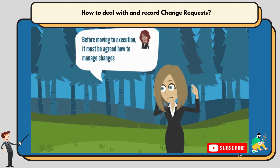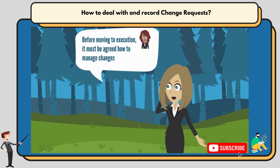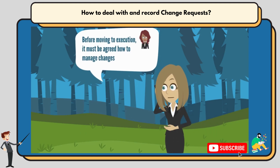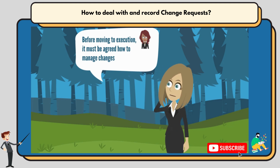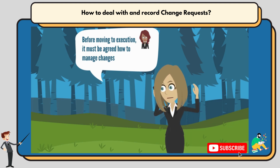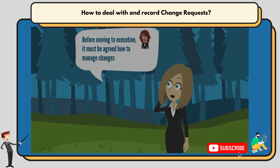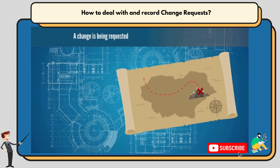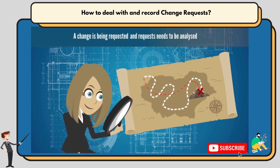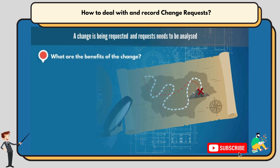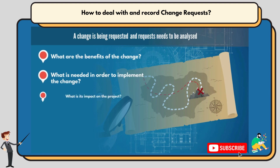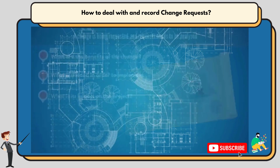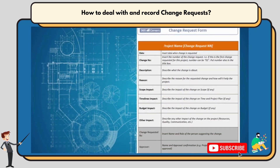Before moving to execution, it must be agreed how to make changes, and as with most parts of the planning process, needs to be established. The thing that will start the process is a change being requested, and that request needs to be analysed. What are the benefits of the change? What is needed in order to implement the change? And what is its impact on the project? A formal document must be created to collect this data — a change request form.